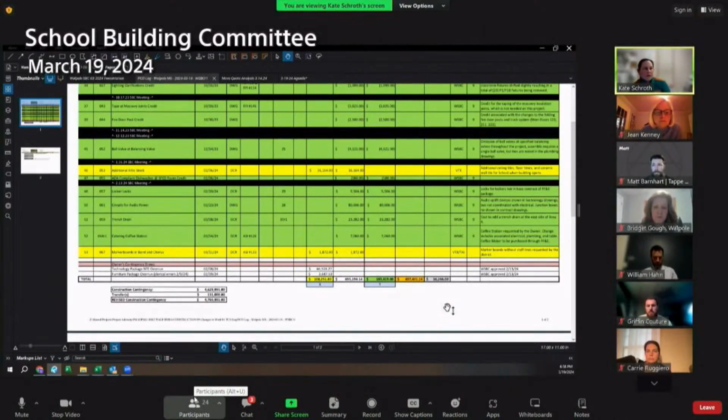So the speakers are owned, but the wiring is not. So it was not something that was in the drawings that were priced out by the filed subbid. So they don't own it. So this is something additional. It's not rework. It's something that wasn't bought out on bid day.